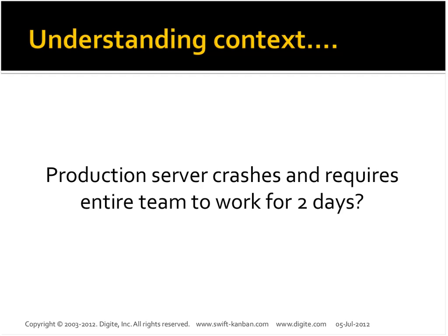Another thing which a lot of teams face is constant interruption, especially if you have a team which is supporting a production environment, or you're a lean startup where you're constantly delivering new features, as well as trying to take care of the existing customers. For example, if something crashes on the production server, it requires the entire team to work. That completely throws off the iteration planning that you did. So more or less every time you hit a bottleneck which throws your sprint planning out of the door, a lot of teams ask what exactly Scrum prescribes in those contexts.